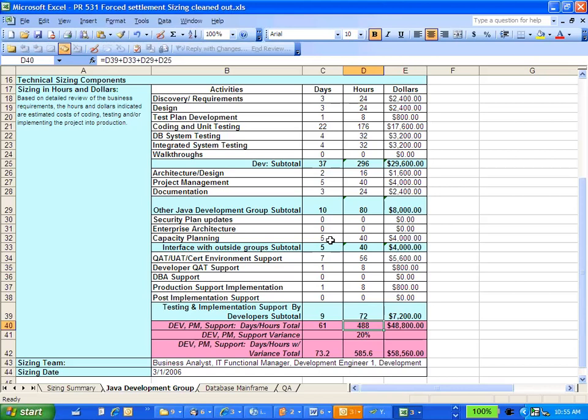Do you think it's just a guesstimate, or is it a real number? It's a very solid number. It's just an estimate. The real project could take 1,000 hours. That doesn't mean that you were wrong at that time. It just means that you had perhaps very unclear information, or maybe the requirements changed along the way. Other aspects of the project were thrown at you that you were not aware about. So, depending upon how unsure you are about the project's scope, you can add a variance, 20%. So this number becomes 1.2 times 488, which is 585 hours.